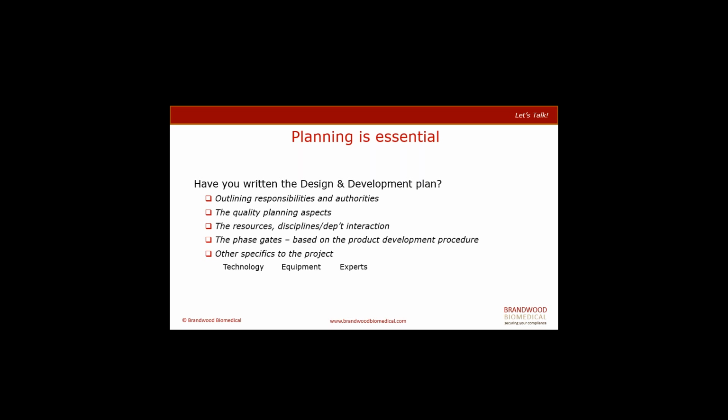You'll need to identify the phase gates or the key milestones within the project, at certain points where the project team, certain parts of management and key people involved in the development cycle will sit together and identify whether a particular phase that the project is going through has reached its end goal and can then move on to the next phase.